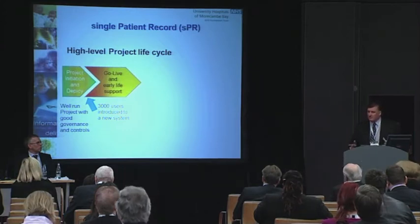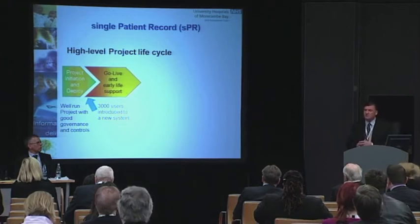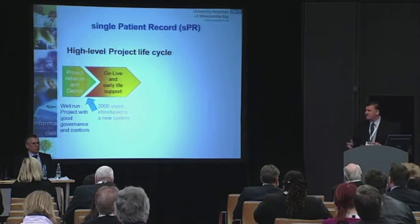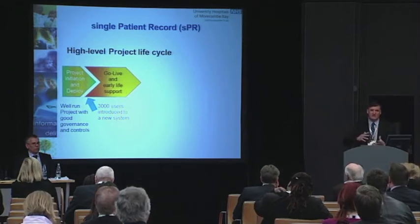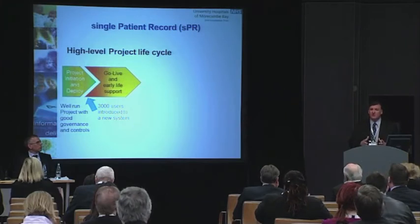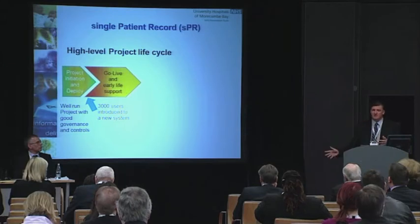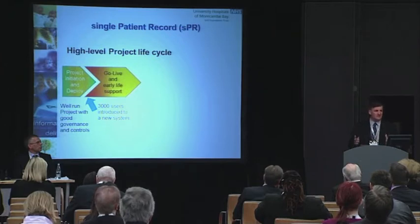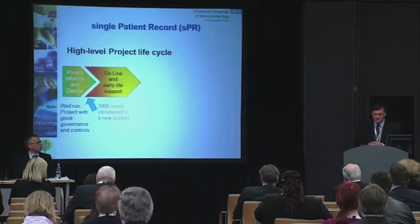So we had quite a big team to support the rollout because it was first of type in the NHS. From our support staff base of about 75, our team actually built up to about 120 for a couple of weeks before go live. And then 3 to 4 weeks later, the team dwindled down. We had Trust staff, Connecting for Health staff, CSC staff, and you couldn't tell the difference. The three organisations worked together.